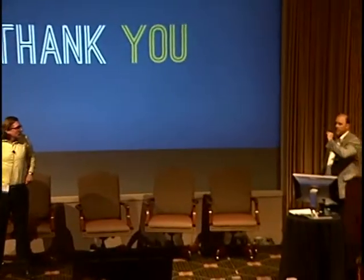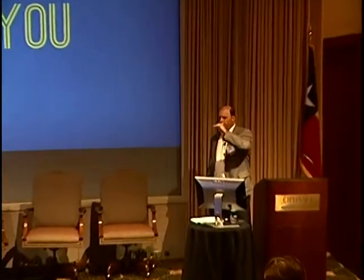But you can take 30% out of a job as you go through a series of repeatable projects as people get familiar with it, or more. And you throw the modular with that, and it can be epically advantageous. So just to pile on a little bit, that study that we did in Ashburn to show how we were driving more productivity and cost down using the same team included ID Group, Digital Realty, DPR, we had Power Solutions and Bowers on the team, and we're all at the table together well before the build cycle was starting.